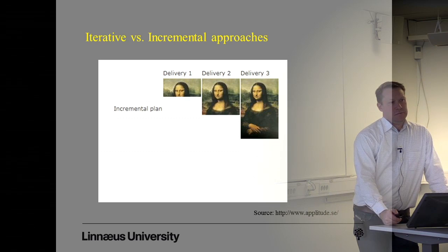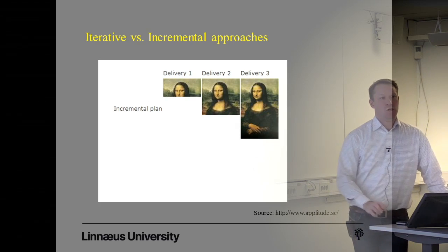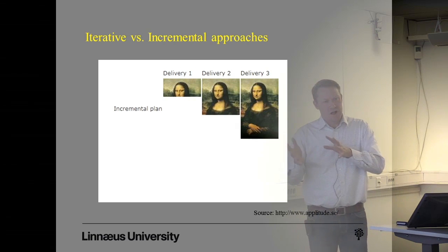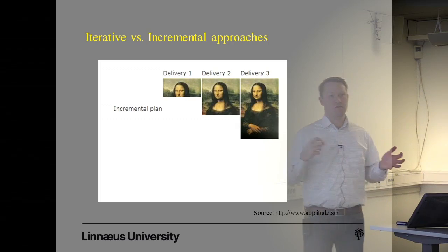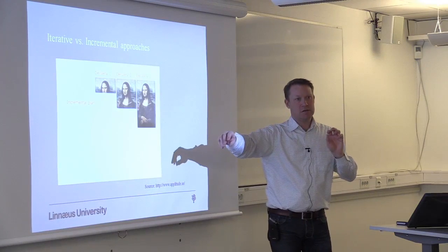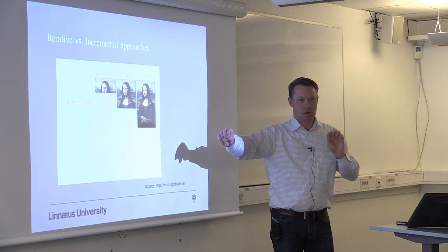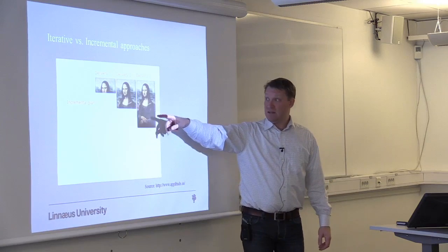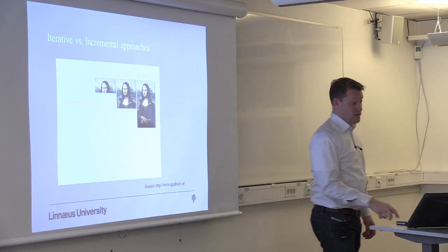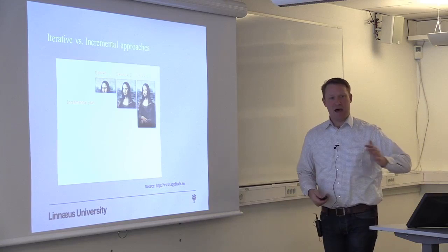There are some difficulties here. One of them is that we don't face the complete integration until the end of the project. So the client is not ready until the end of the project. And that was not good because sometimes we make mistakes, and the only way to discover these mistakes is to actually go all the way to implementation and verification. One of the mistakes we may make is an integration problem from the client to the backend through the business intelligence. And one way to get around that is to use an